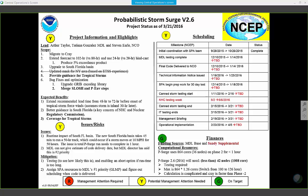You'll see the EKDMOS and gridded MOS do it in later quads. And it's getting into the RTMA via all the first guess fields that are used for the background for the RTMA. And so that's why the RTMA is dependent on the next quad on RAP and HRRR. But is the consolidated terrain done? Yes. The blend group had agreed to use the downscaling of the models.